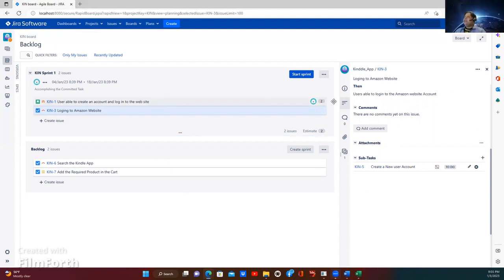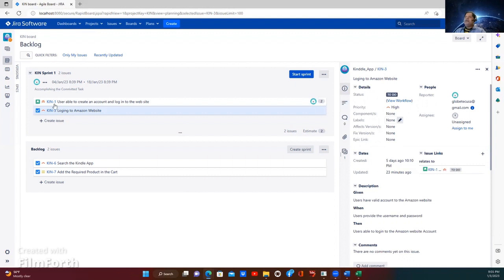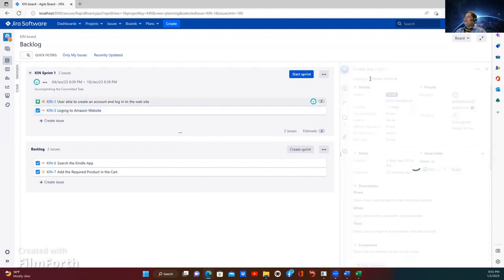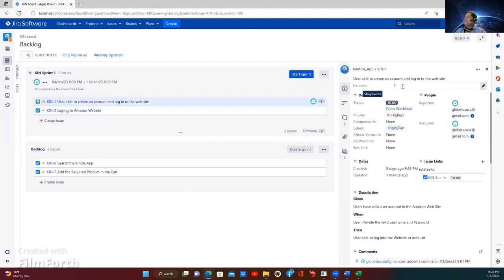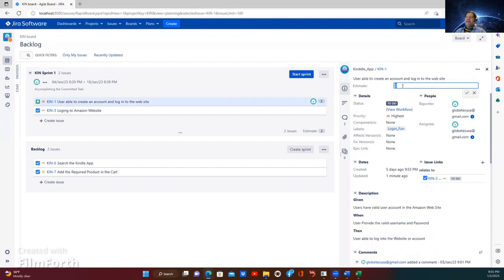I'm saying, are you clear on what I did? When we start the sprint, it was saying that the user story or the task does not have a value estimated, meaning how many hours of work we will need to do. That's why we came here and estimated this as a 2-pointer. It means we may need 2 days to work on this user story, at 8 hours a day for one resource. Yes.